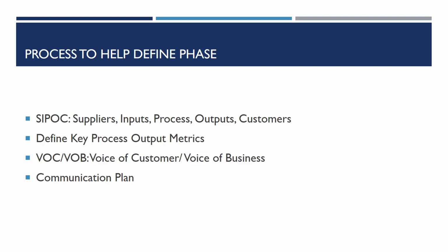Finally, the team developed a communication plan, or a roadmap, for how information will be disseminated, who will be responsible for communicating, and what key messages need to be relayed and to what audience. The communication plan may look different for each recipient. For example, the team decided to create a blog post on the hospital system's internal page to let staff know of the coming changes and decided upon a monthly progress report to executive leadership to be sent via email.